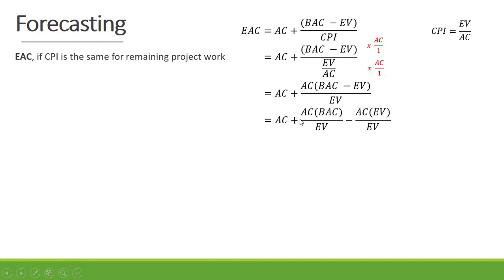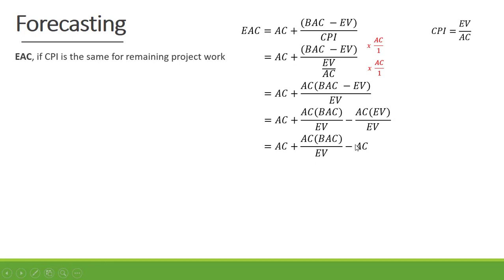Now expanding: actual cost plus actual cost times budget at completion divided by earned value, minus actual cost times earned value over earned value — and the earned value cancels out. So we get actual cost plus actual cost times budget at completion divided by earned value, minus actual cost.